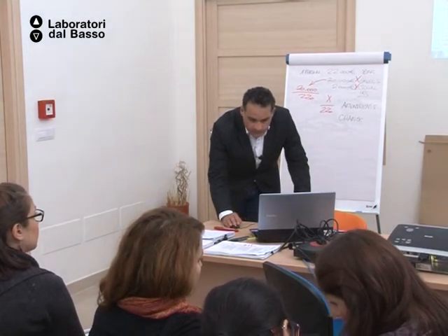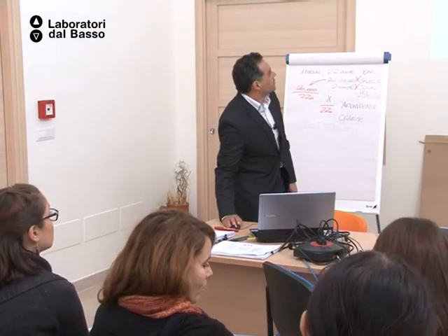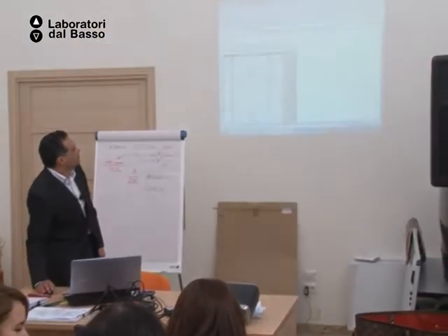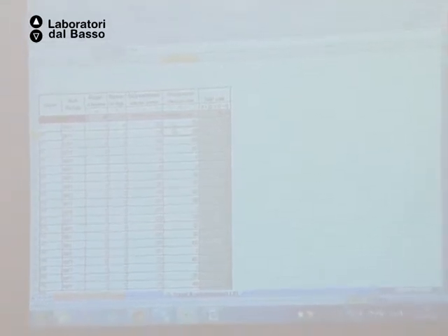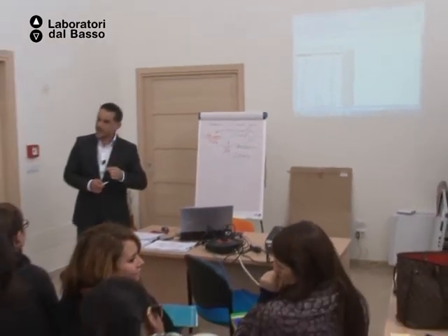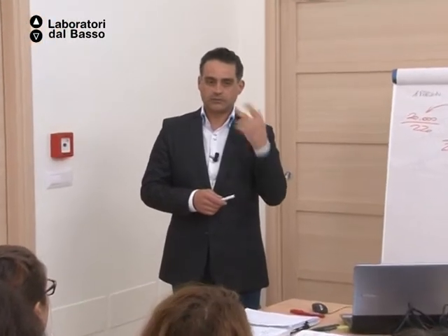One thing here. This column I, average price return journey, this doesn't obey to sellings. This obeys to you asking your travel agency for the best price of the trip. Pia mentioned it, she wanted to be precise, rightly: the subsistence cost is not the plane ticket, train ticket. Don't use bus tickets, okay? Don't use cars. They don't understand cars. They ask you, I don't know if you have experience with renting cars. I said it was a small scale project. I said, okay, all right, forget about it. It's okay. It was fun anyway. I did all the costs in Spain, went to Barcelona. I use things that they can check.